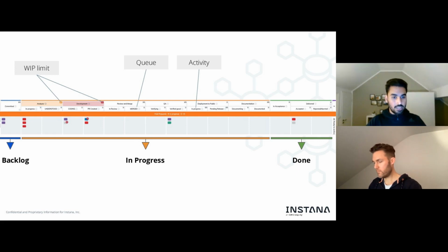And what this allows the team as well is to identify where those bottlenecks are at the end of the day, right? You could already get a feeling for cards. I don't know, in this example, you would know, all right, a lot of cards spend a lot of time in this verifying step in QA, right? So you already have the feeling that you somehow have a bottleneck in QA because things just take a lot of time, right? We are done in 2 days implementing something and it takes 5 days to be QA'd. So you already know, okay, something might be fishy, or maybe we are doing something wrong at some place, right?